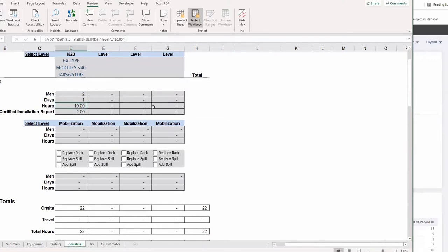And then also there's always a getting on site time, for lack of a better term. You can't just pull up to the front door and walk in and start working, obviously. Most places are going to have a gate up front, a guard shack, or whatever you want to call it. By the time you get checked in, you get the right person to come escort you back to where you're going, you're at least burning an hour.